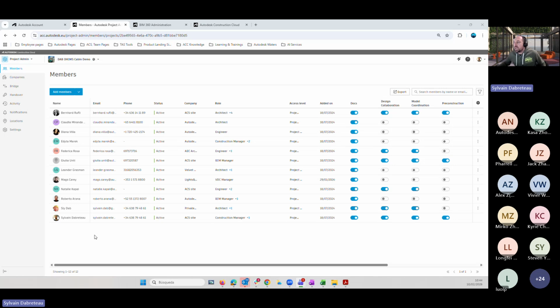So if we had only individuals and people, when this person is leaving, we need to retrieve this person and replace with the right one. So when we set up notifications or permissions or workflows, we will be doing that using the company or the role, for standardization processes.